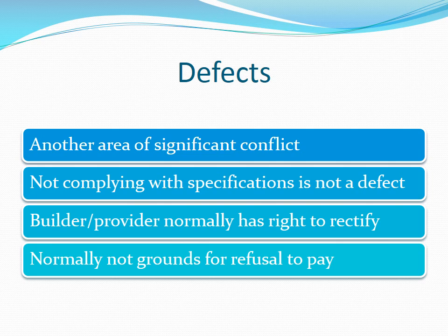If, however, you are claiming for the progress payment due on completion of framing and you have only dug the foundations, the lack of framing is not a defect but a failure to do the work for which you are trying to claim. At times the distinction will be fine, but usually the guidance and definitions in a standard contract will suffice to determine which category a situation will fall into.